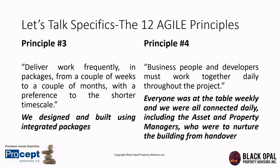Remember, using our PropTech advantage with Primavera P6, we had been inputting all of our commodities costs, all of our labor costs the night before, so that in the morning when my team and I walked in, on the dashboard of myself and my senior project managers, of whom I had four, was the S-curve that we were following, and we were able to see whether or not there was any variation in terms of our expected delivery of time as well as our budget. So that powerful technology helped us to ask the right questions. So we went out to the site, we saw all of that, and we responded to it. And we came back to our office, worked on the solutions.